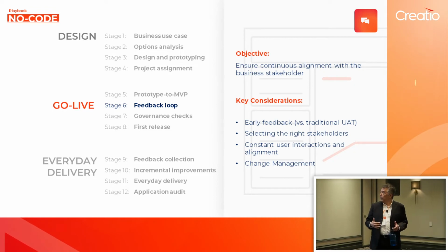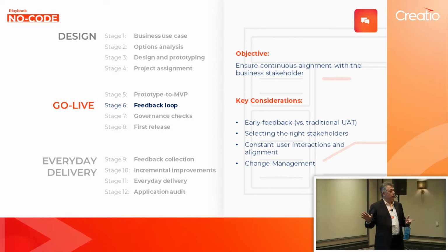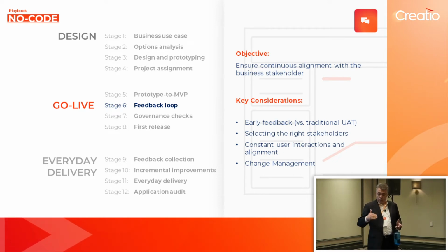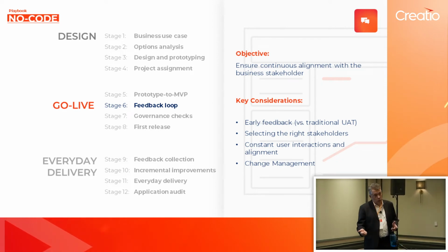The other thing that Kanban does, which is important, is it promotes transparency. So all the work is broken down into small chunks of work, and you have full visibility over what's being worked, what's about to be worked, and so that is important as it relates to communicating back with the business, with your business stakeholder. At any given time, they know exactly where things are. They can help you change priorities of things that haven't started yet, but it gives you a common language of how to communicate back and forth that demystifies it.